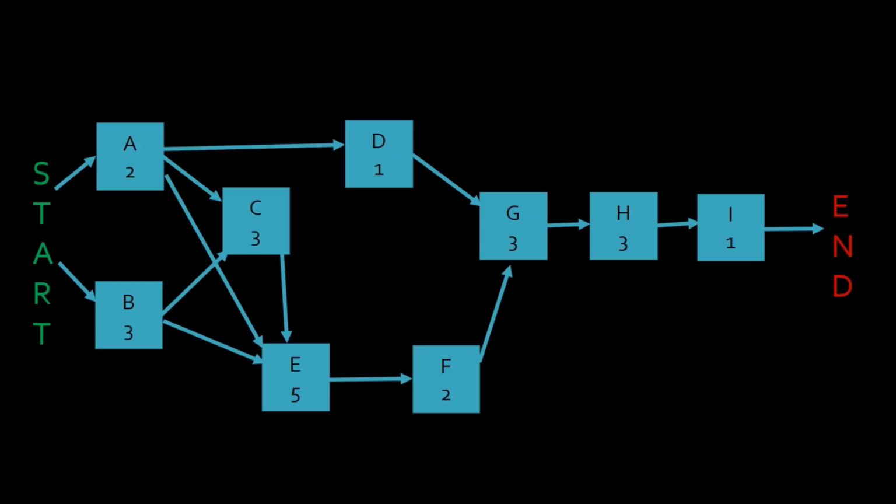So let's start our forward pass calculation. I'm trying to figure out the duration of my project in real time. So we're going to start at start. Remember, we're looking for the early start and early finish. That's what we're doing now with this calculation. So the null activity start can start on day one, and it can finish as early as day one, right? Let's go to task A. That's the first, so that's the early start and early finish. We're going to do this to every single one of the tasks across, based on their dependency. So watch how I do this.